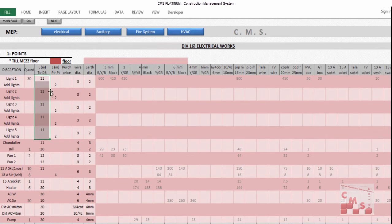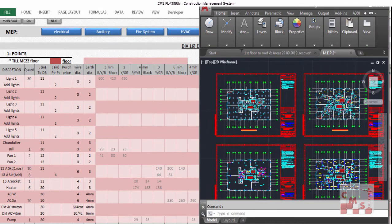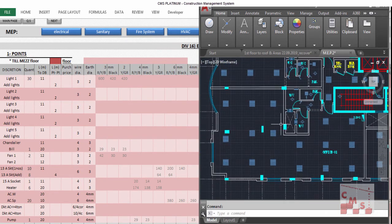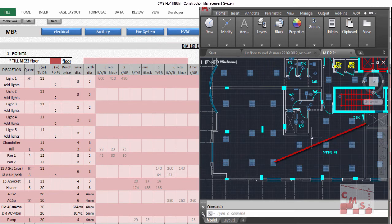CMS also asks for a distance — the distance from the light to the DB. This distance is required to calculate the length of the cables, wires, and pipes. You insert the average length from the light to the DB. If you have the drawing, you find the DB location, identify the center light, and measure the horizontal and vertical distance to the DB. CMS then calculates for each light the length of wires and pipes connecting the light to the DB.